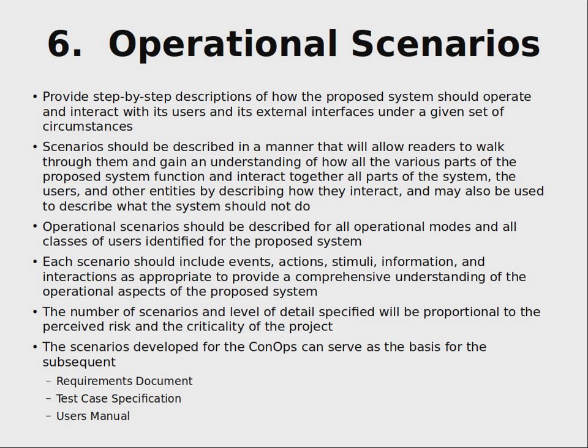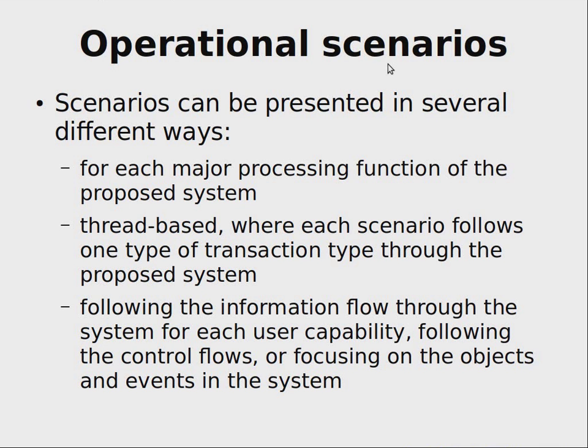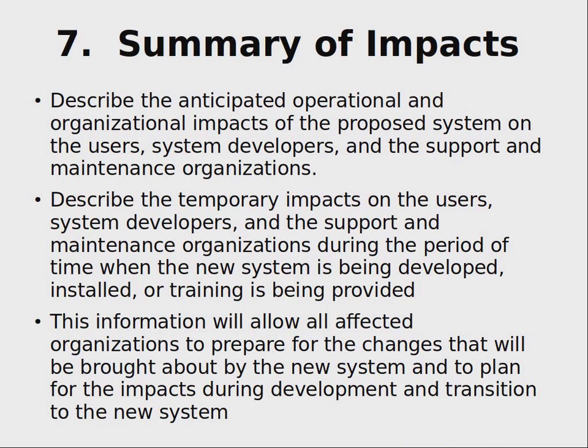This part of operational scenarios may be input for more detailed cases for requirement specification, for test case specification, for the user manual, maybe for system design as well. Then you describe these operational scenarios or use cases or studies. Then you make a summary of impacts.